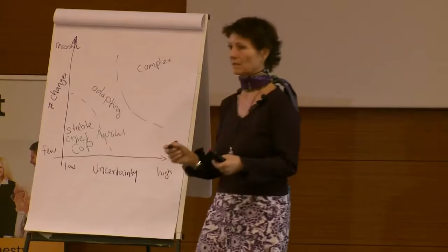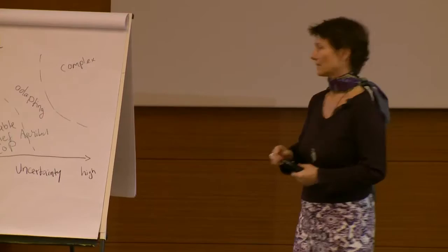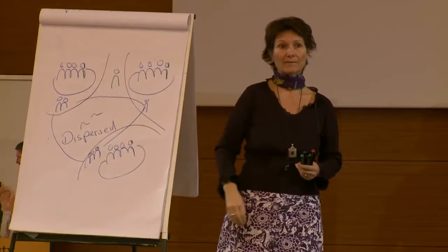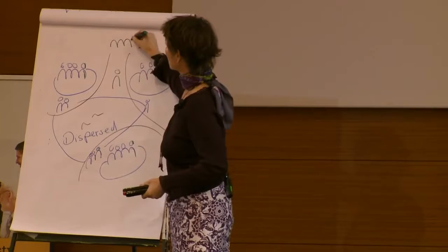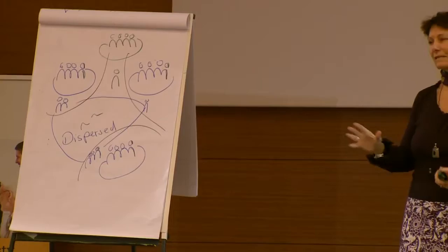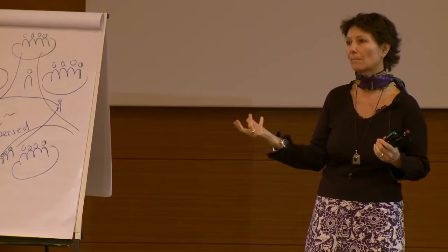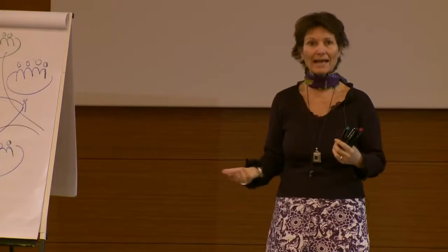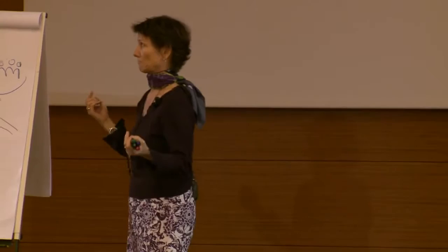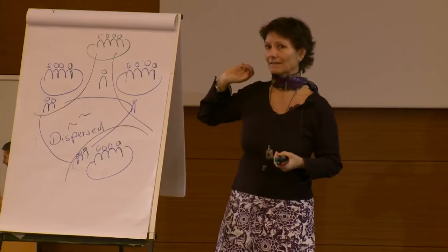If we are on the other extreme, so if we are in a really highly complex area, things are changing all the time, remember, then what we need is a separate team dealing with this. So we have another team, which I call a technical service team, who deals with everything around conceptual integrity, architecture, whatever is the thing that's making our world so complex. That can be, for one system, everything around UI, for another system, everything around databases, for another system, whatever it is that makes our system so complex and where we have all those difficulties, uncertainties, changes.